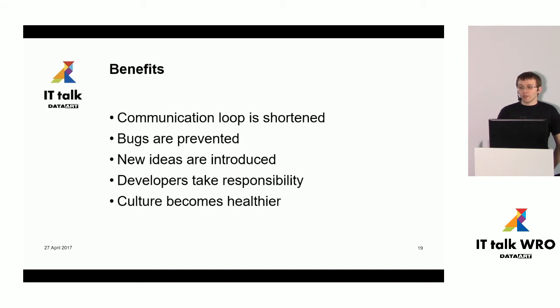Meanwhile, benefits of such approach are quite huge. First of all, communication loop is shortened. So this understanding confirmation cycle happens quite quick. This significantly reduces number of bugs, especially those caused by misunderstandings. This also brings an option for developers to introduce their ideas.